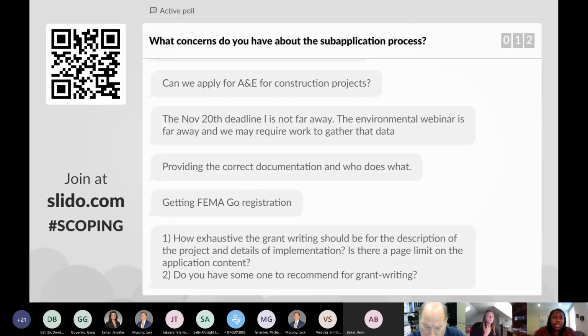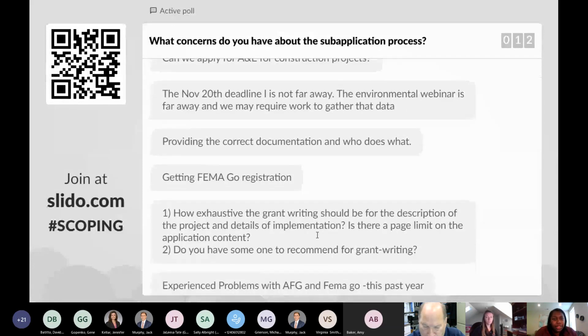And then we can talk about grouping those together. But grouping those together poses some issues, because without the engineering already being completed, FEMA is generally unable to confirm that it's technically feasible. So it puts you in an awkward position where your project might not be awarded.